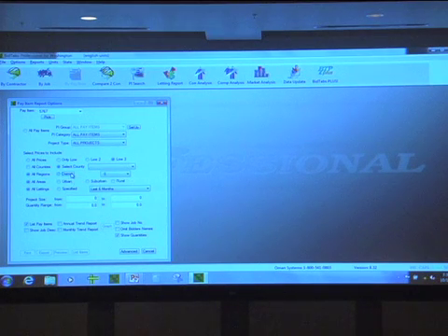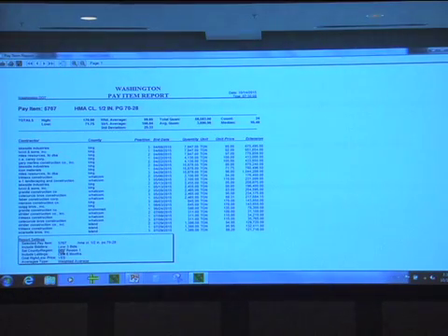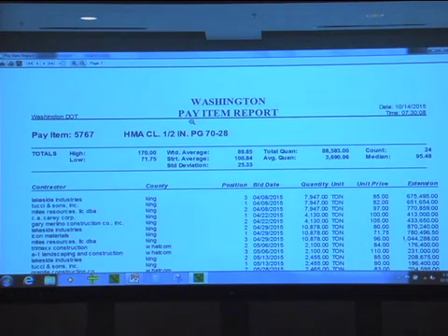If I'm clicking too fast for you, just let me know. So I pick our region, and then I look at that. That's kind of narrowing up my data set here, getting it closer to home. We've used it in 24 jobs, and now it's up to $90 a ton. So you can see just narrowing it up that much has made quite a bit of difference.